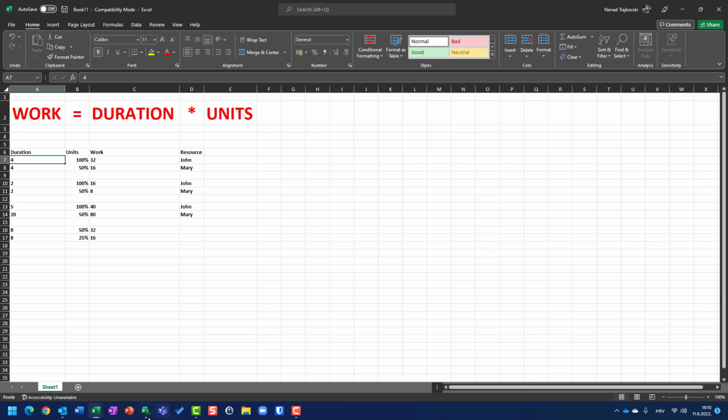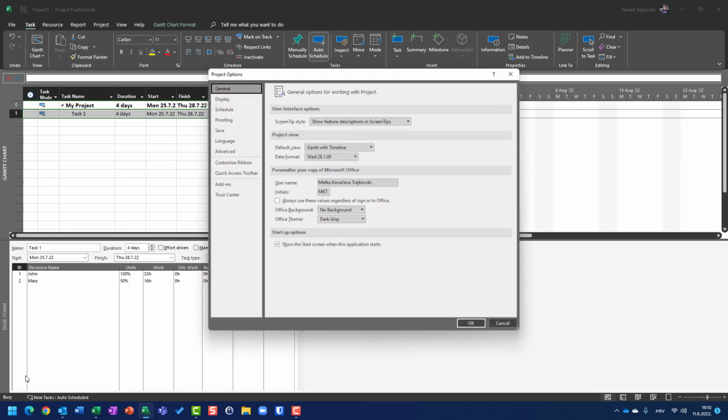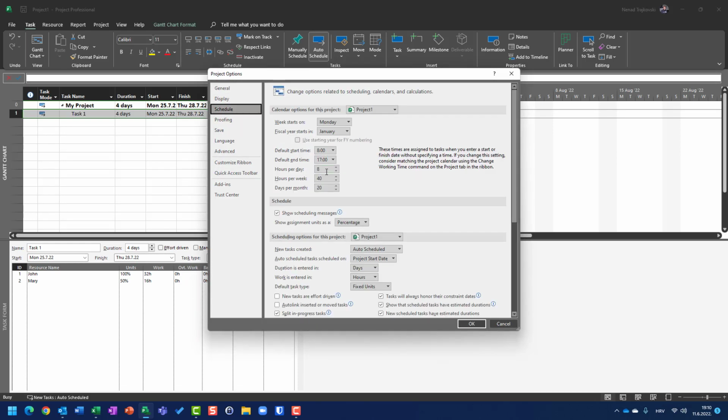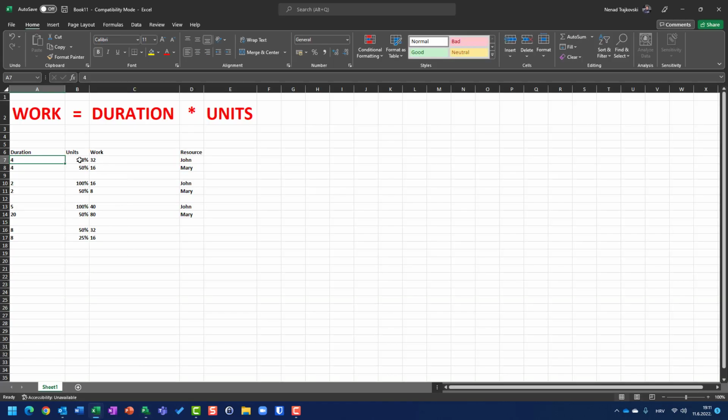Why? Because here in File, Options, Schedule, you will see that 1 day is 8 hours. So 4 days are 32 hours.